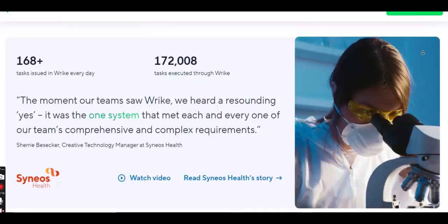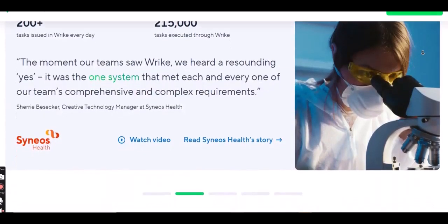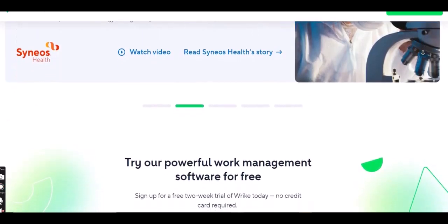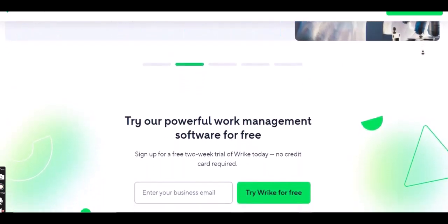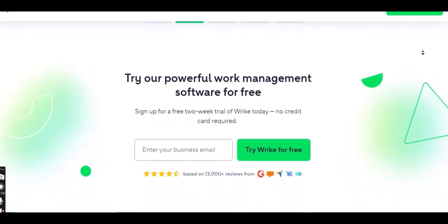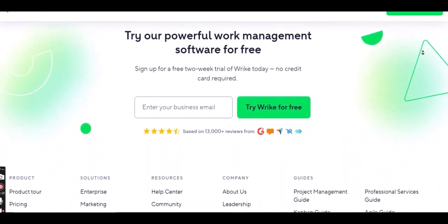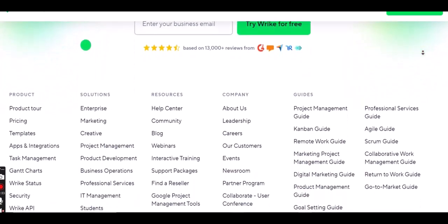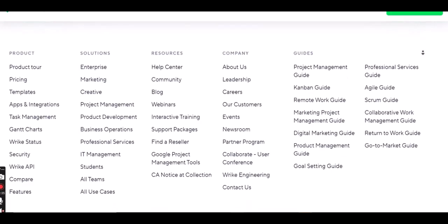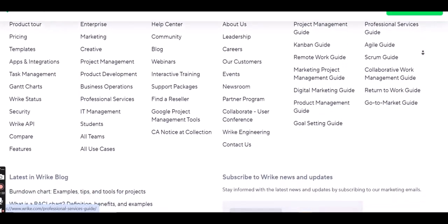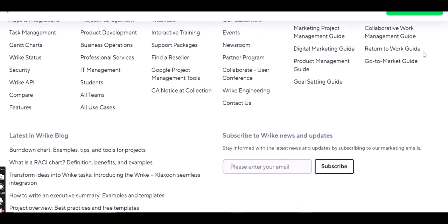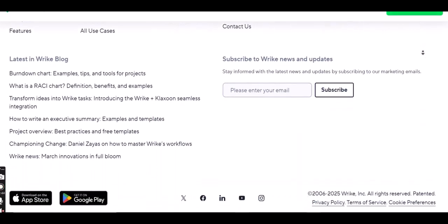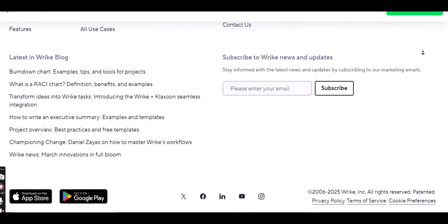Step 7. Group your data. Group by. This step organizes your data into meaningful categories. Think about how you want to segment the information. Common groupings include assignee, to see tasks per person; status, to see tasks by their current stage, e.g., new, in progress, completed; project/folder, to group tasks by their parent project or folder; due date, to see tasks due in specific periods; custom fields.